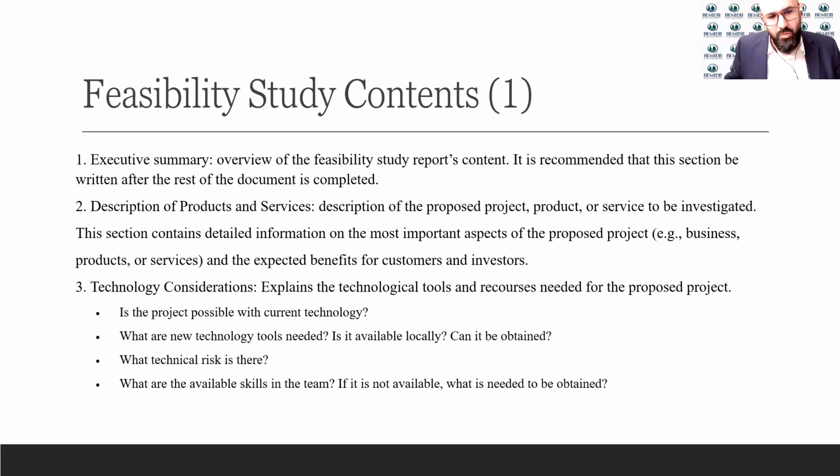Section 3, you need to include the technical considerations, including the technological tools and resources needed for the proposed project. You probably want to answer these questions. Is the project possible with the current technology? What new technology is needed? Is it locally available, or where could we get it? What is the technical risk of this project? What are the available skills in my team? If not available, can we obtain them? Can we hire new people, or can we train our current team?